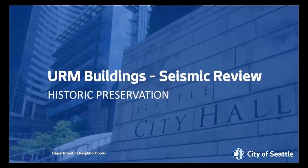And then lastly, for anyone who does work in Seattle, I just want to let people know that in the last 6 weeks, we have changed our application process, and we've moved online. And we're now using the Seattle Services portal on the Department of Construction and Inspection's website for submittals of certificates of approval. So if you are submitting a project to us, you would be doing it that way. And if we determine that the work was consistent with in-kind maintenance and repair, we would notify you of that determination, and we would not assign a fee to the application.